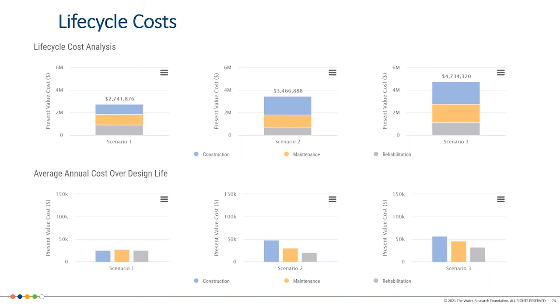I want to also mention that the University of Utah, Christine Pomeroy, did an excellent job of the cost buildup for these life cycle costs. So when you can select the study period from up to 50 years, Christine did a line item buildup of multiple different types of technologies. All of your technology selections you can make are done by line item cost buildup. So it's very detailed cost, and it is regionalized. So depending upon the region you are, there is an adjustment for these costs. Next slide.